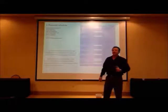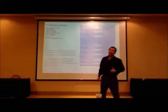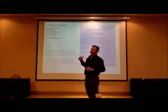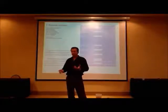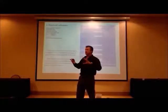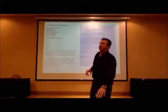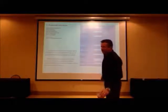What percentage would you say would be the last draw? 30? No, it's not enough. I would say probably 35, typically what we do. How do you base that? The first draw, if he's buying a lot of materials, might be more, because he not only has to feed his family, but he's got to buy all the materials. Once the materials are bought, now it's just getting the work done. So every job is different, that's really hard to answer. You're going to have to analyze each and every job and determine that yourself. You want to keep them hungry until the end.